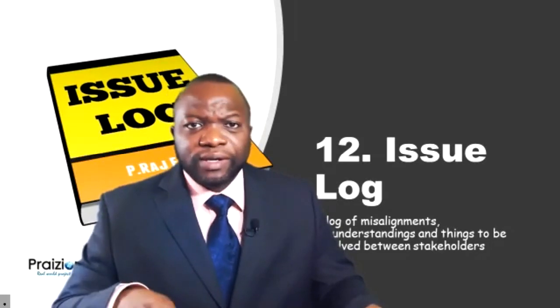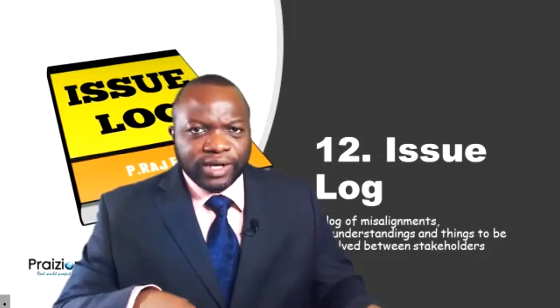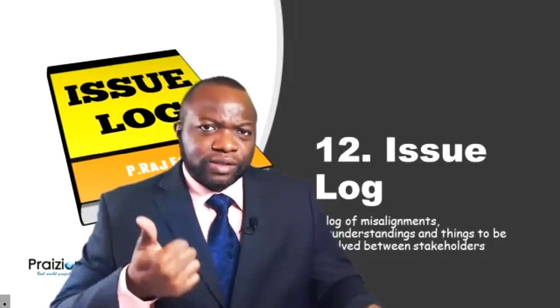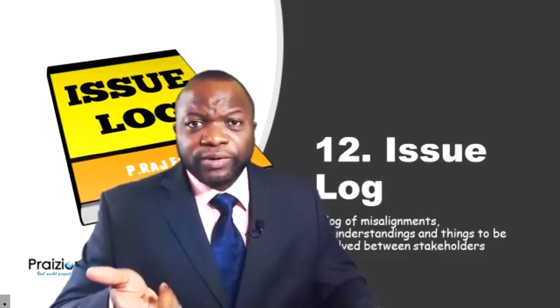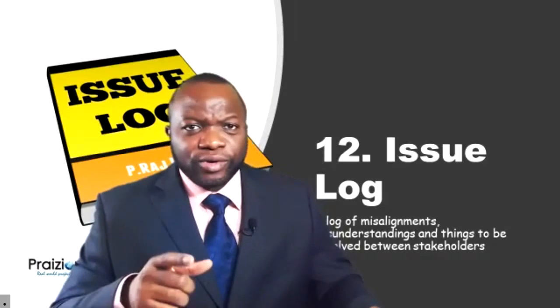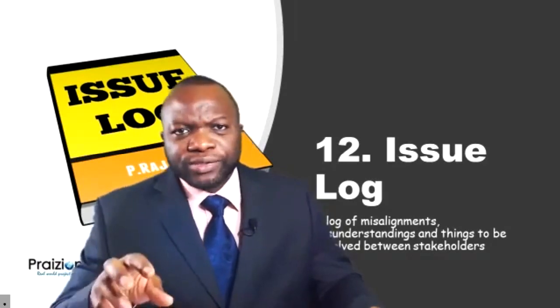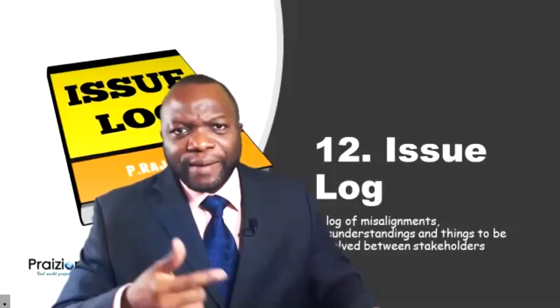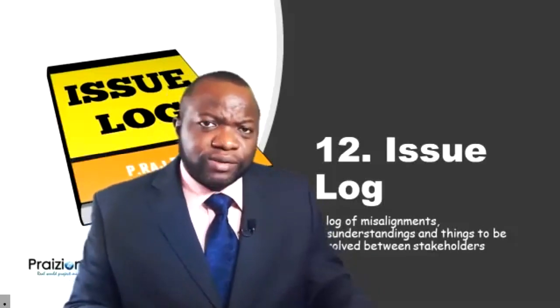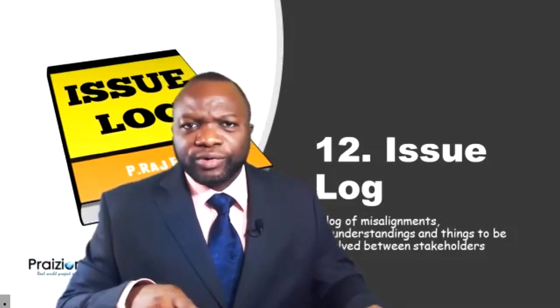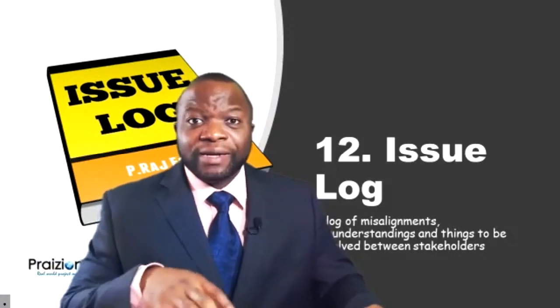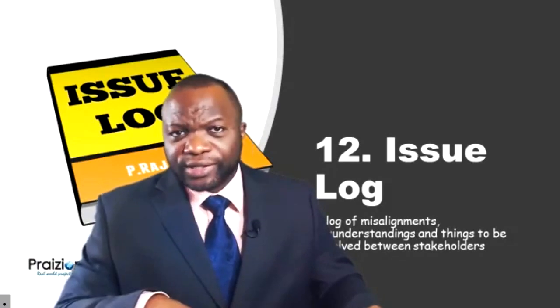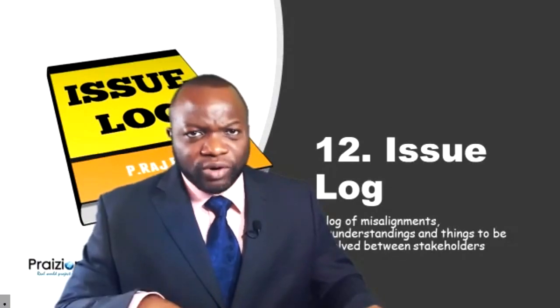Hence the acronym DIG-CIV, D-I-G-C-I-V. Define the problem, identify, using your Ishikawa, using your fishbone, if you call it that, the root cause. Remember, the cause, the problem, the effect, that model is also espoused in the world of risk. Cause, risk, effect. But in this context, we want to analyze the root cause for this problem and also the possible effect of what is happening now. Again, this is not risk management. This is issue resolution. This is problem solving.